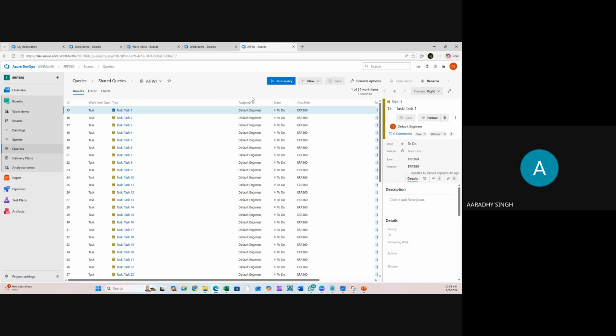Okay. Suppose, guys, one task is, suppose in your database you have to create a total of 600 or 900 tables. For every table, you have to create a view. So what you can do, somewhere you'll maintain the table names. On the basis of those table names, directly within 1 minute, you can create the tasks. Thousands of tasks you can create within 1 minute using the Excel formula and import them. It's very easy.